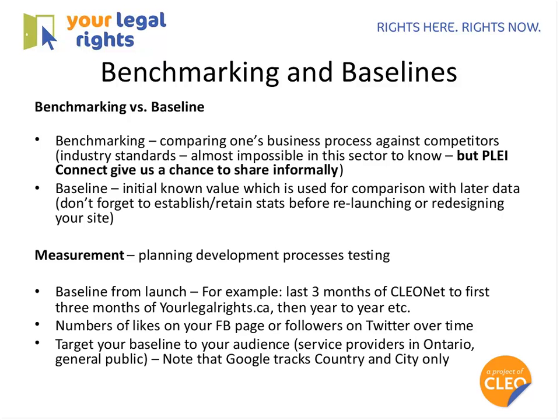So again, don't forget, if you're going to relaunch or redesign your site, even in a small way, or improve it in some way, you have to establish a whole bunch of core statistics and numbers so that you have a baseline to measure whether your redesign helped or didn't help. And sometimes we forget to do that.